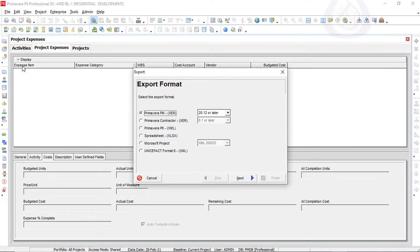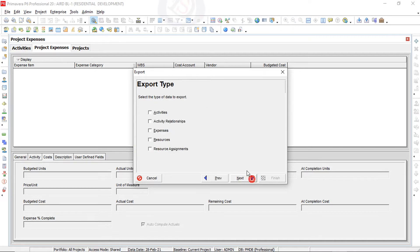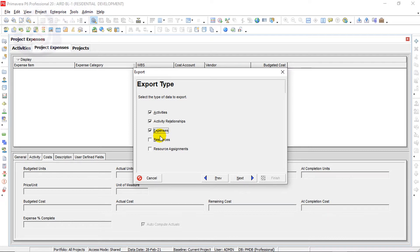Under File you can see Import and Export options. I will go to Export. When you click Export, you see several options. Choose Spreadsheet because everyone can use a spreadsheet XLS file. Click Next, and under export options I will select only Activities, Activity Relationships, and Expenses to export and import the expense cost.